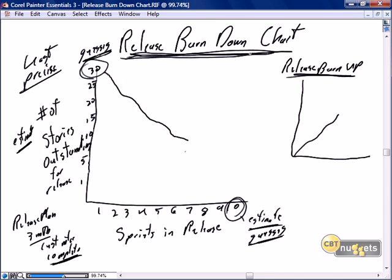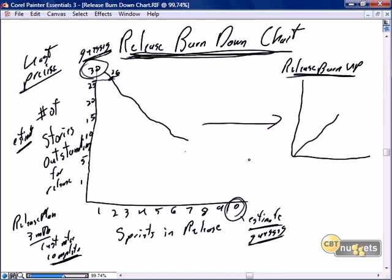Which is why I say it's the least valuable of all the progress tracking charts, but it's still relatively easy to maintain and certainly gives visibility into how we're doing to accomplish the release. The maintenance is pretty straightforward: at the end of sprint one, we have completed four stories, so we have 26 stories left to be done, and so on until we burn our way down. It's a good visual representation of how we're doing against the release. For those who prefer upward trending progress charts, we can turn that into a release burn up chart — starting at zero through the number of estimated sprints, with an expectation of going up to 30.